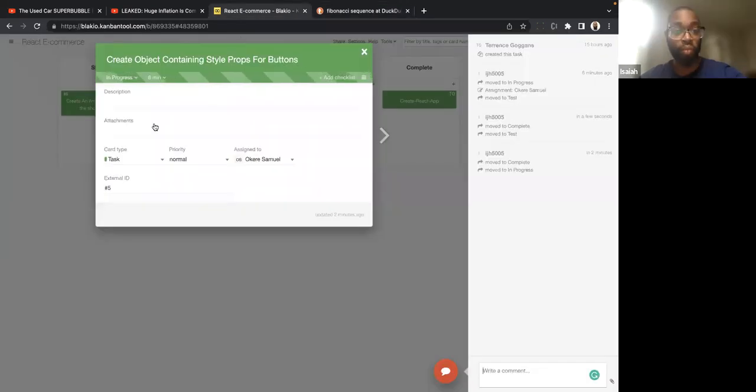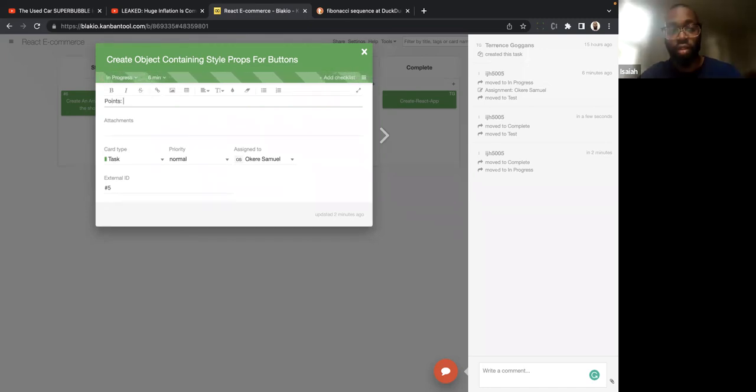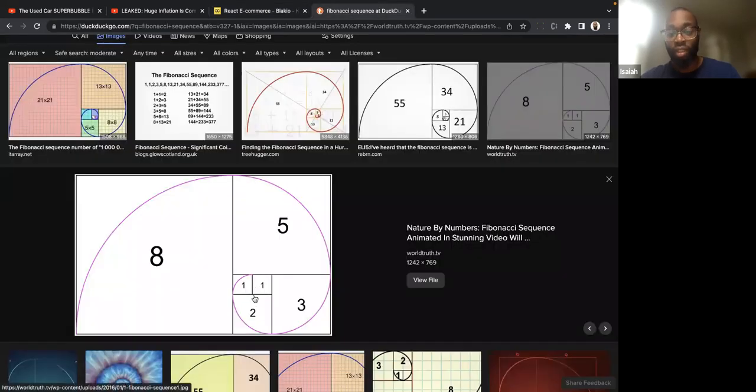What we'll do is for the description, every time y'all create a ticket, you can just say points. You give it points, like points one, just in the description. Like, this is a one pointer. This should be fast, and fast is a few hours. So these two within a day. And then 3, it may take 2 days for you to do.